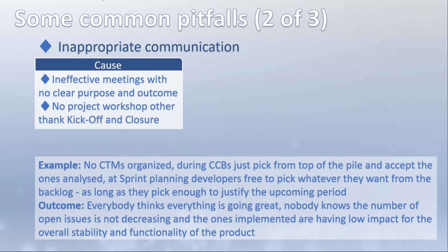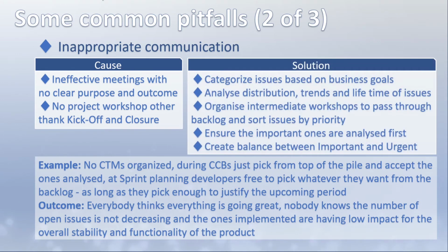The solution here had multiple steps, like categorize issues based on business goals, analyze distribution trends and lifetime of issues, organize intermediate workshops to pass through the backlog and sort issues by priority, ensure the important ones are analyzed first, and create a balance between important and urgent.